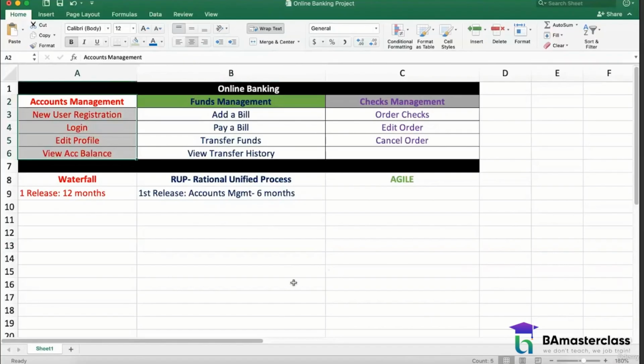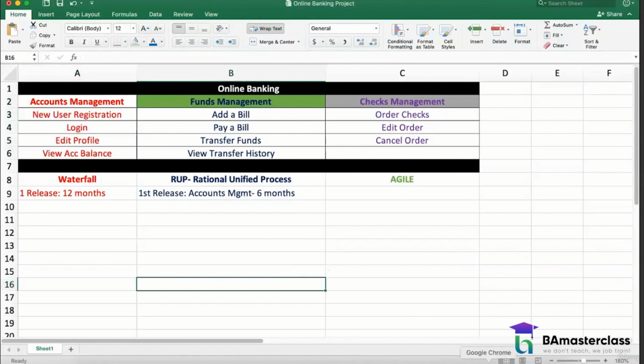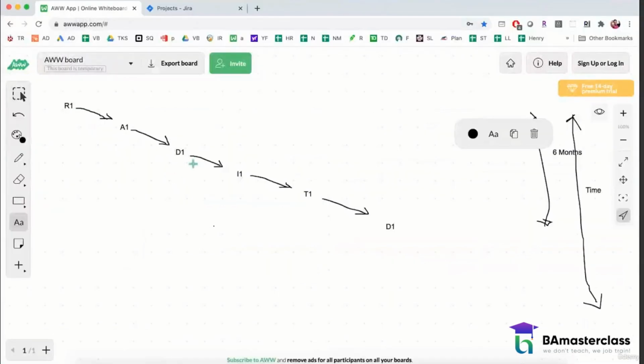So I'll give you an example, right? When the change control board reviews this change, they come back with an estimate. They say, well, we currently are midway in the design phase, and if you want to make this change in this release, it's going to take me 4 more weeks, and it's going to cost XYZ dollars to implement this. So the current deadline, rather than 6 months, will now have 7 months for the first release.